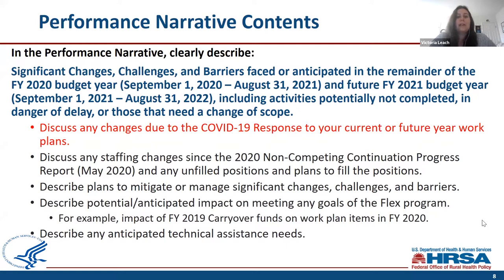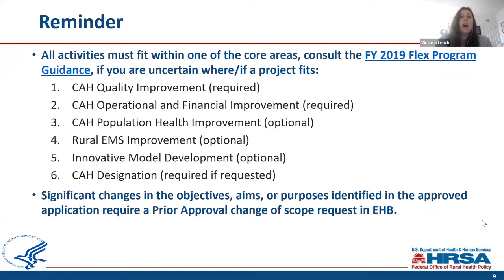Describe plans to mitigate or manage significant changes, challenges, and barriers, and describe any potential impact on meeting Flex program goals. For example, this could include the impact of FY19 carryover funds on work plan items in FY2020. Please describe any anticipated technical assistance needs. As a reminder, all Flex project activities must fit within one of the core areas. You can consult the FY2019 Competitive Flex program guidance if uncertain. It must fit within one of the six program areas: quality improvement, operational financial improvement, population health improvement, rural EMS improvement, innovative model development, and critical access hospital designation. Significant changes in objectives must go through the prior approval change of scope process in EHB.